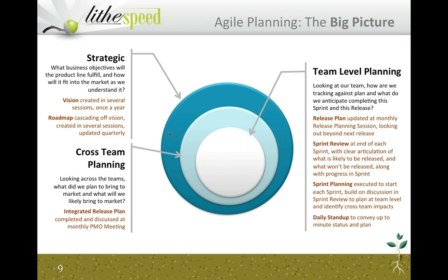So to put it in a nutshell, the cadence that you'll typically see for these portfolio management sessions tends to align more or less with the sprint cadence of the respective teams that are involved. And if there are waterfall teams, what we're doing really is creating artificial cadences within which they can interact with the Scrum teams. So they would get together every 2 weeks, despite the fact that they might have multi-month phases that are going on, because we're trying to create a way to roll it all up.